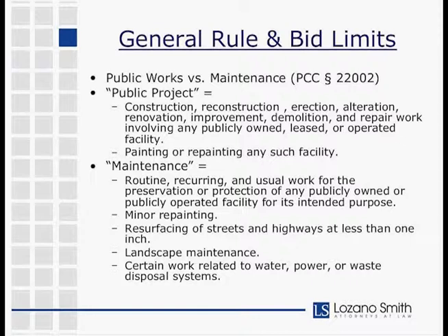Maintenance also includes resurfacing of streets and highways at less than 1 inch. We've seen school districts use that definition when it comes to resurfacing or paving their parking lots or throughways on school district property. Maintenance also includes landscape maintenance, as well as certain work related to water, power, or waste disposal systems. So again, there can sometimes be a question of whether a certain project or certain work constitutes a public project or maintenance work.